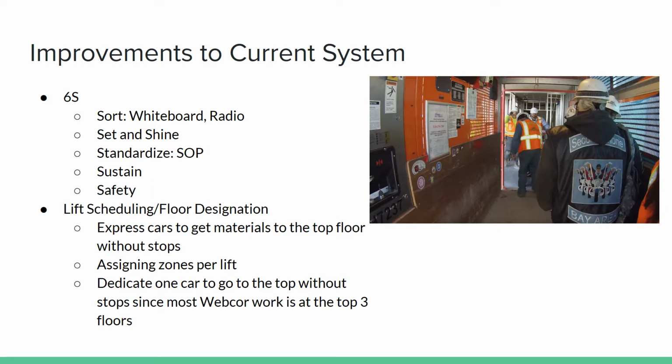And after that, since most Webcor work is done on the top 3 or 4 floors, dedicating one car to go to the very top floors without stopping would ensure that a lot of the Webcor employees who are working on the top few floors are able to get up there as quickly as possible.